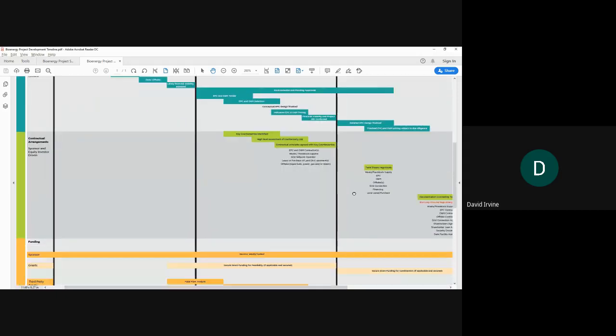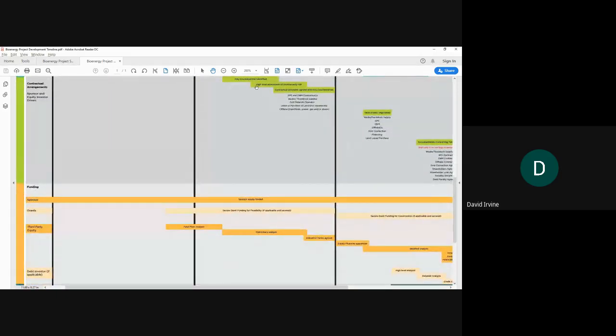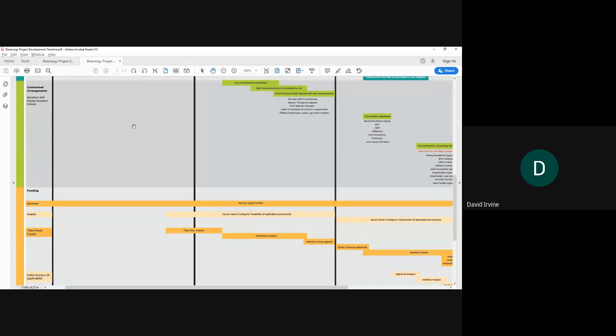You start to look at your EPC and O&M, and obviously your detailed EPC and O&M pricing design phase as you move forward. In terms of contractual arrangements, just moving this to the top, you typically won't be in a position at pre-feasibility phase here to have contracts negotiated and signed. You might have MOUs or letters of interest or letters of intent. But when you get to the commerciality phase, absolutely you'll need to identify your key counterparties, look at the contractual arrangements to make sure it's bankable or sufficient to attract equity, looking at EPC and O&M, feedstock, grid operator requirements, leasing or purchasing of land, etc. And then obviously fine-tuning that in this phase here, which is your execution phase.